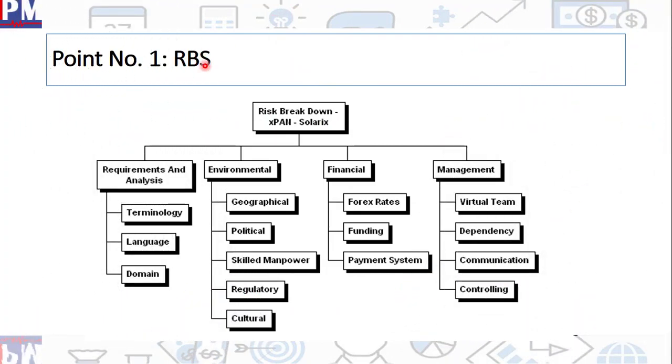Point number one, RBS, Risk Breakdown Structure. For some reason, this part has been explained pretty badly by many of the books and including trainers. When you have this process called plan risk management, which is an output of a process called plan risk management, it does not identify risks. But what it does, it actually finds out the major categories of risks which are applicable to this particular project.